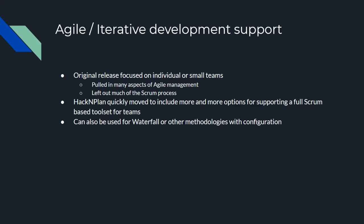It's usually identified by having a project be broken into two to four-week sprints. So before each sprint developers will estimate what they can complete within the next two to four-week period and at the end of it all of those assigned tasks that the developers selected for that period should be in a state where they can be demoed. HackNPlan supports Scrum primarily through the creation of sprint specific boards and making it easy to see the metrics that it's easier to plan and estimate the workload that you can support or that your team can support for the upcoming sprint.